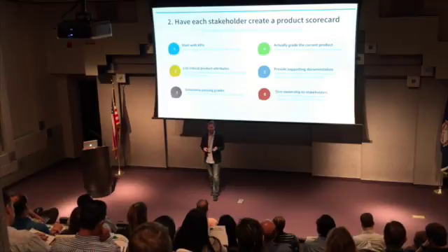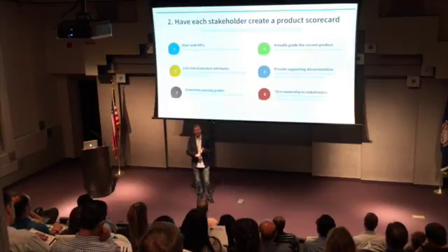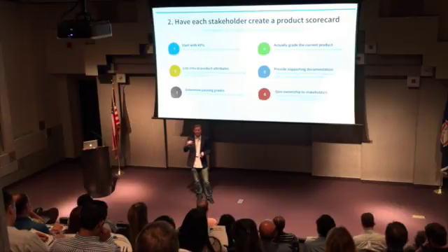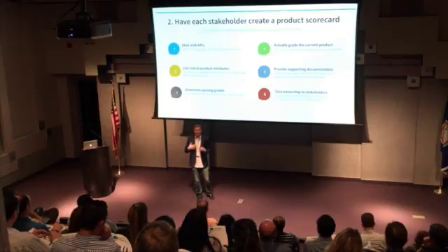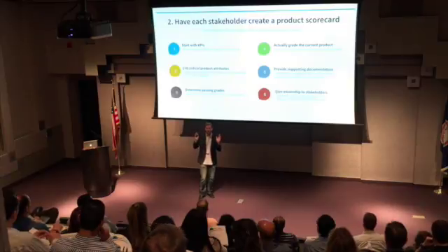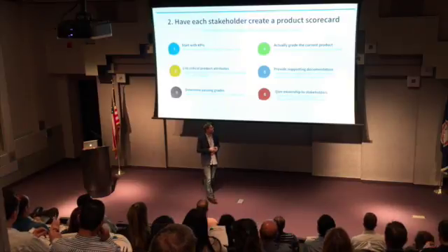If user experience can say, well, we run the numbers and we can understand what the click-through rates are, and there's certain kinds of funnels that users have to go through, and people are dropping off of the funnel at this stage. Here's the dashboard that basically proves that. That's a much stronger case for why we need to invest in that area of the product than to just say, I think so. Right? That doesn't really do much.